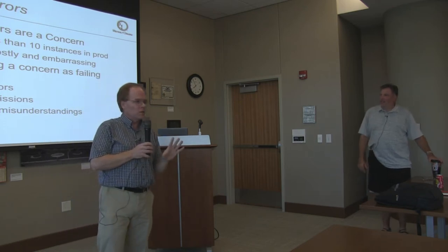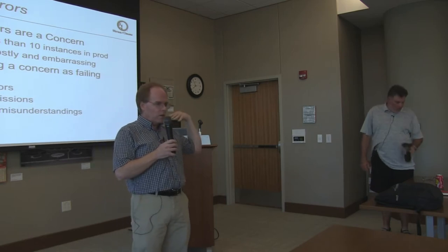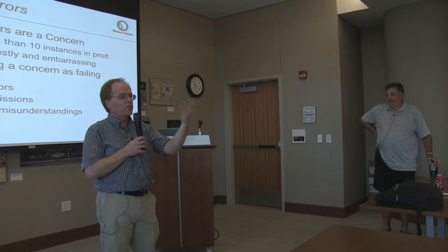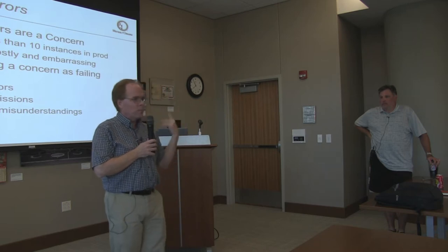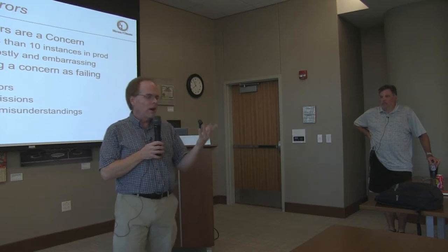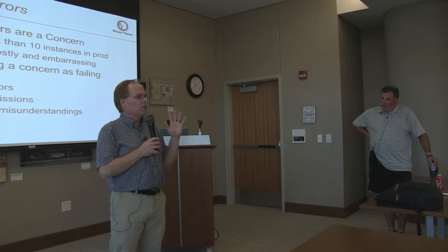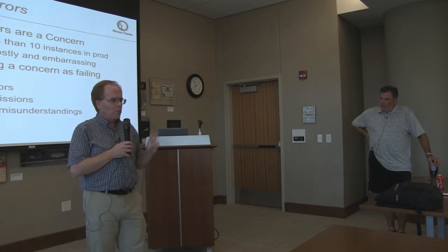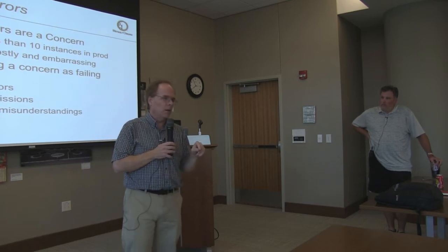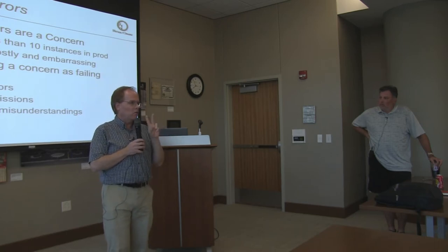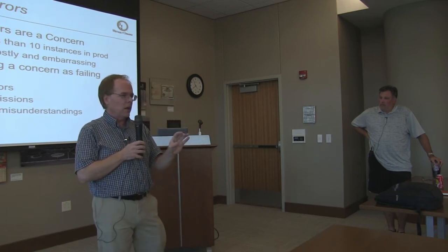And at that point, we have two choices. We can spend thousands of dollars and get everybody else who has to be involved in an off-cycle production involved and move it off-cycle. Or, you know, the system is complex, but it's flexible. Usually there are workarounds. Of the 5 or 6 times that we've had runtime exceptions in production for scenarios that we should have but did not code, probably 2 of them on their own were important enough to justify off-cycle changes. So at least two occasions between 2005 and now, the rating engine was responsible for us having to move something into production.